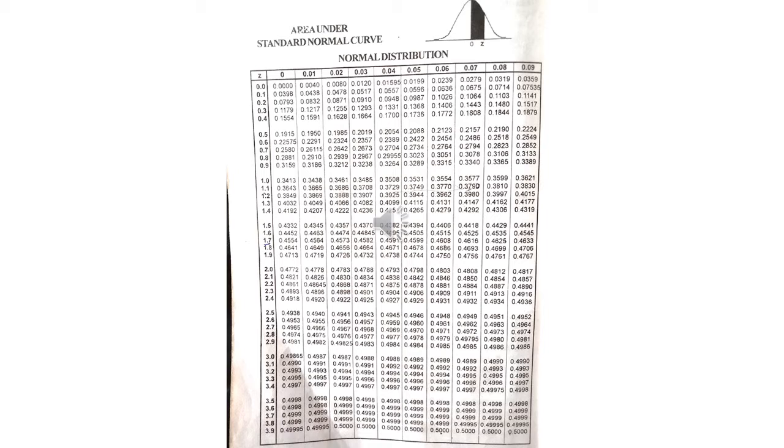That is, if you got the project duration as 20, your last answer is 20. From that 20, if they demand to complete that project in 25 days, how do we find it? There we use a particular formula that I will explain in the next slide. The formula we are using is Z is equal to T minus TE by sigma. T is the due date they demanded, they said 25. TE means the expected time we calculated at the end. We got 20, that is our TE. So T minus TE divided by sigma.